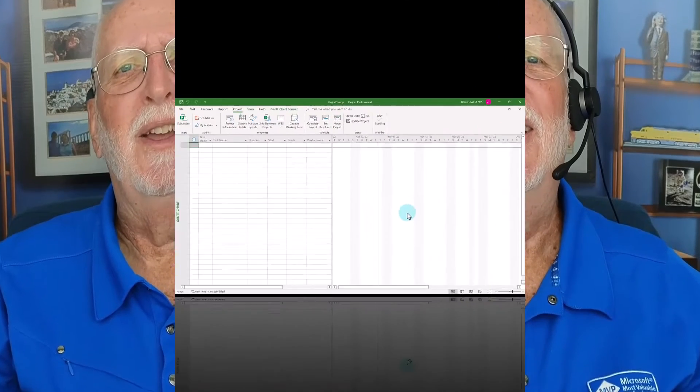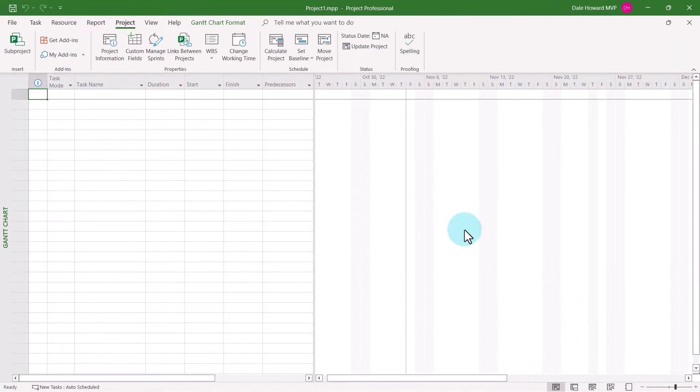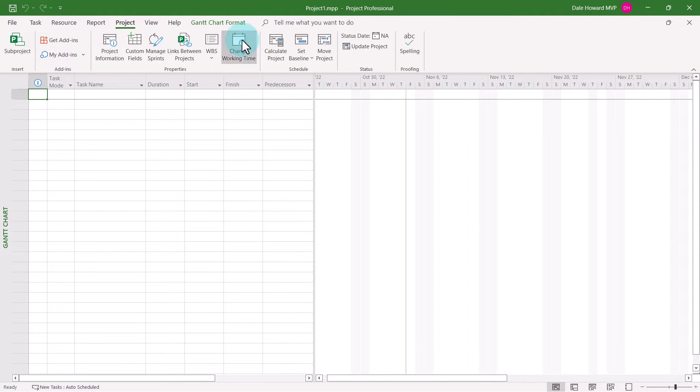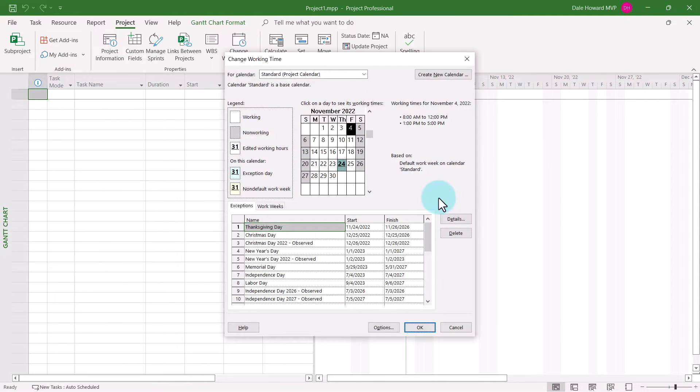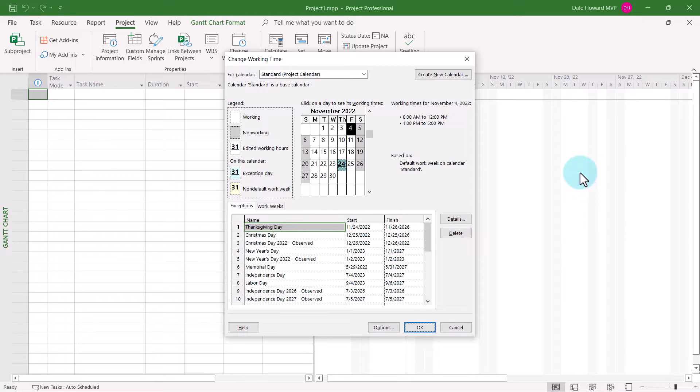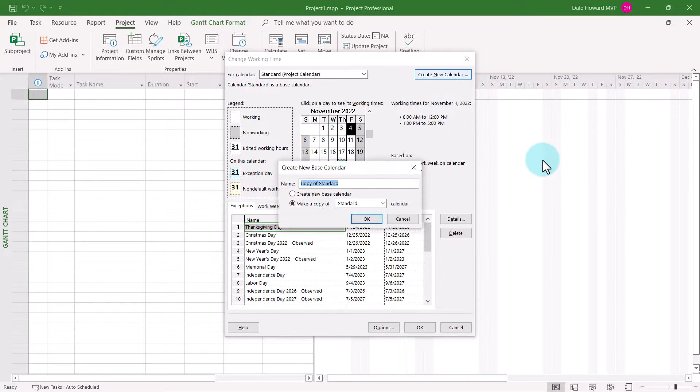So let's get started. To create a custom calendar in your project, click the Change Working Time button in the Project ribbon. In the upper right corner of the Change Working Time dialog, click the Create New Calendar button.